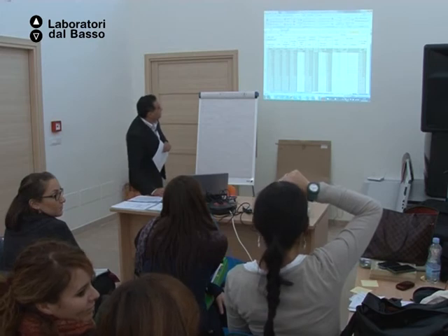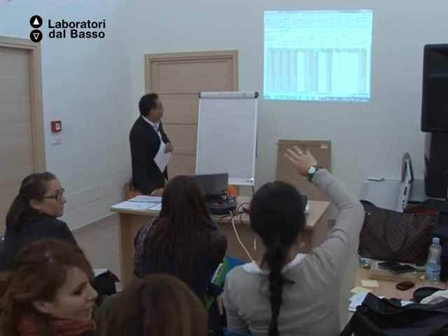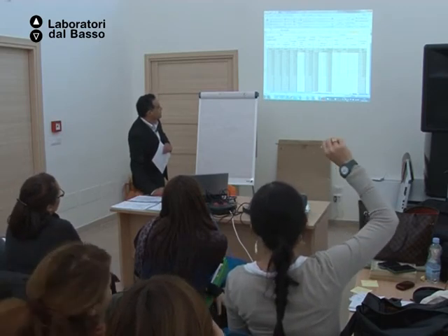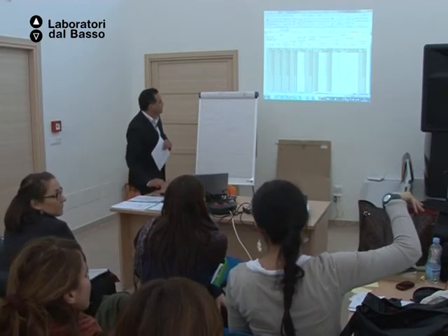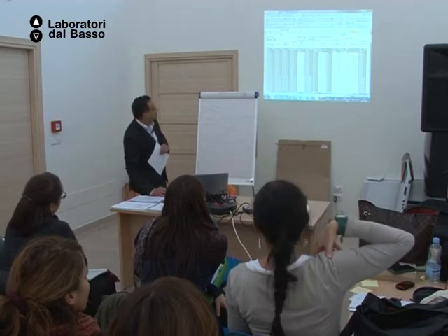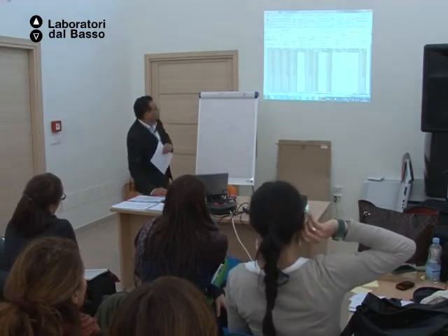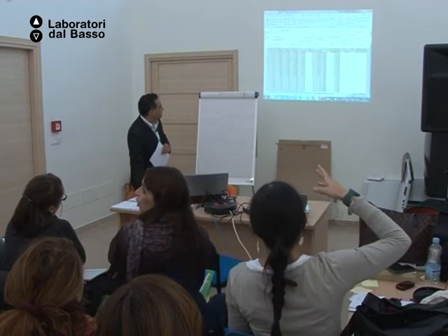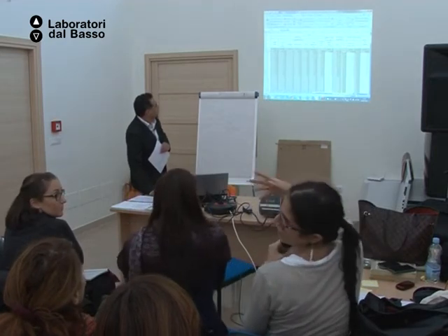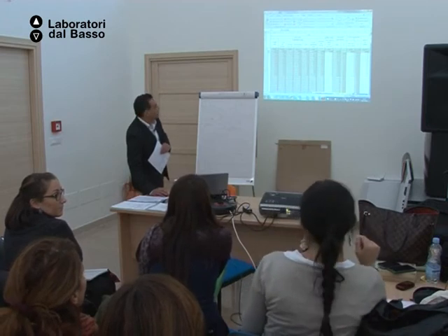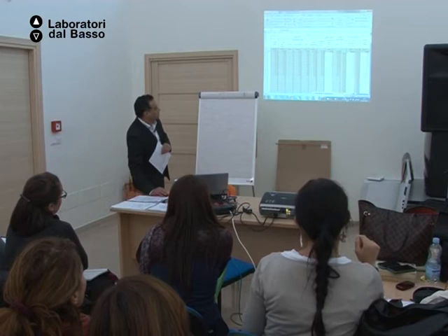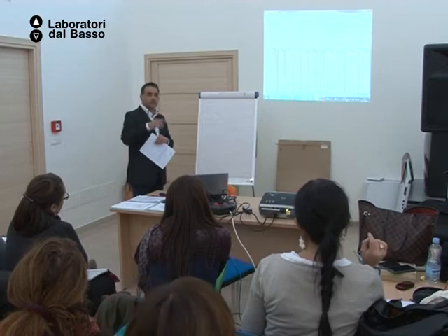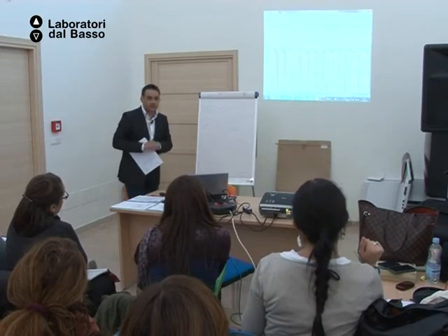In each line there are indirect costs. Yeah. So it means each partner could have 7% of indirect costs, referring to its budget. Is it correct? Yeah, the total sum of the indirect costs of the partners gives 6.99% of the total budget. Okay. Partner 1, 2, 3, 4, 5. And the total sum of indirect costs of all the partners compared to the total budget gives you 6.99%.